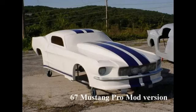Success metrics, project completion on budget. The project is considered successful if the total cost stays within the allocated budget of $340,200. Dyno performance improvement, horsepower and torque measurement accuracy should improve to within ±0.5% tolerance compared to the old dyno. This ensures reliable data for engine tuning and performance analysis. Project timeline, the project should be completed within the planned timeframe of 10 weeks, including dyno delivery, installation, calibration, and software integration testing.